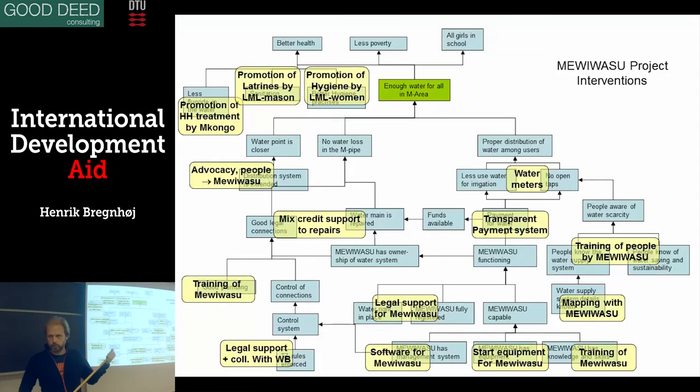It's understandable, yeah. Pretty simple. So we only make one problem. You only make one problem in a problem tree. It's very important. You only have one problem to solve. If you have more problems, you make more trees. Yeah. That would be it.